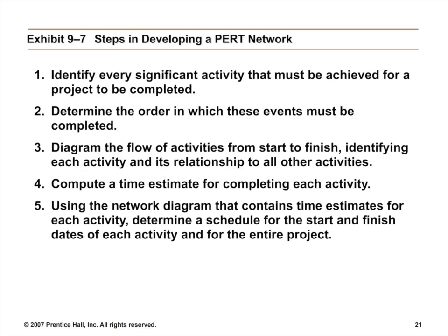And then second, determine the order in which these events must be completed, and then diagram the flow from start to finish, identifying each activity and its relationship to all other activities.